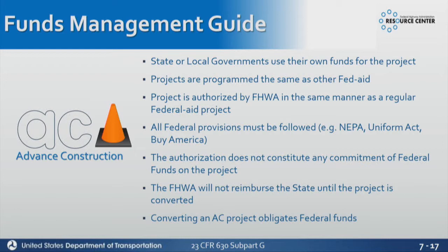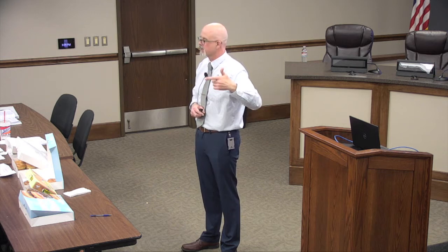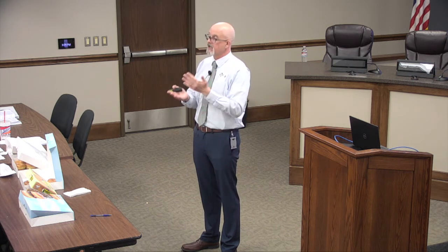And I've seen some states, the way they do it is a cash flow tool. Colorado, they AC every single project. And then as bills come in, they just convert. But they only convert for the amount of the bill. In my mind, that's like way too much work, because they're having to go out and touch that project every time bills come in, but they like to do it because it allows them a little flexibility in their funding.